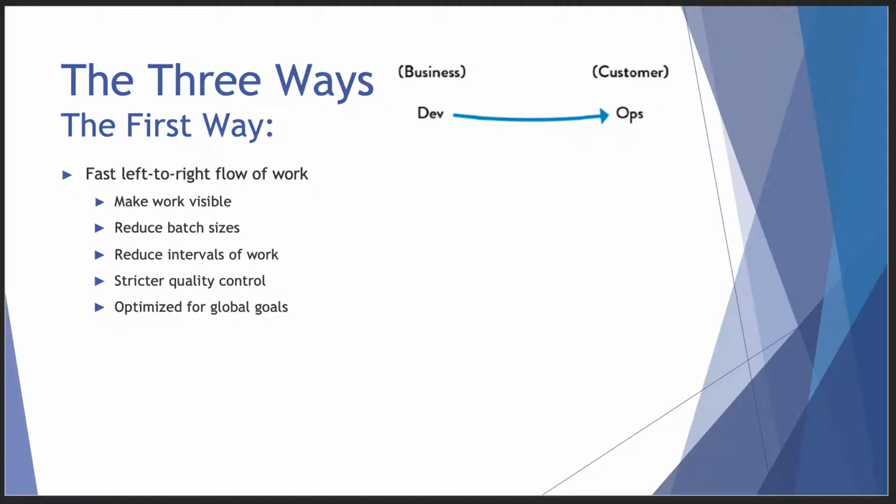With product manufacturing, you have a good visual indicator of how your process is working. With software manufacturing, you don't necessarily see those things because it's all done on computer screens in front of people's eyes. But the way to make your work visible is to put up what's called a Kanban board to visualize work, where you can actually put work processes on cards or other physical representations of the work and move them from one section to the next to visualize how they're coming along. And that's the best way to make the work visible in a software development environment.